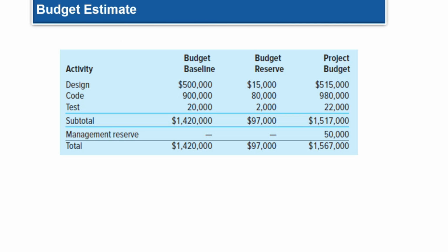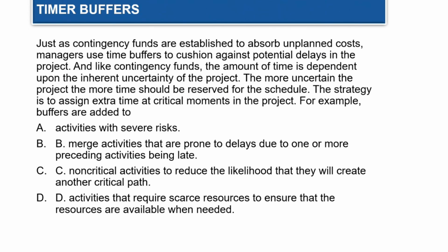Budget estimation is related to the contingency fund. This is part of the contingency plan, and it can be put into the costing at the beginning of the project. So in the charity modeling event, the fashion show, some project budget or budget reserve can be allocated, and then with the associated reserve, you need to specify the reasoning and the possible risks that the funds can be allocated to. This shows the time buffer example.